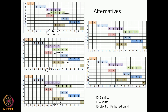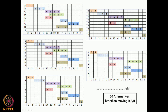From the float perspective, D has 5 possible shifts, H has 4 shifts, and E has 1 to 3 shifts depending on how much H shifts, since E precedes H. If we keep E in the same place and just move H and D, we have a total of 20 combinations of shifts. When we keep trying the various alternatives of what we can shift, there are 50 total alternatives in the solution space.